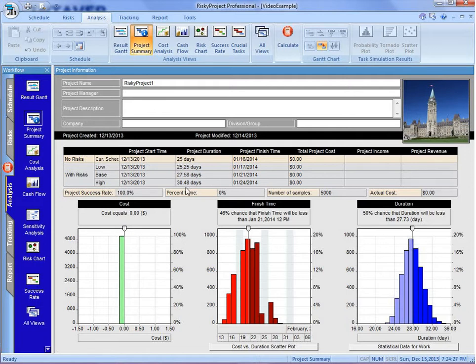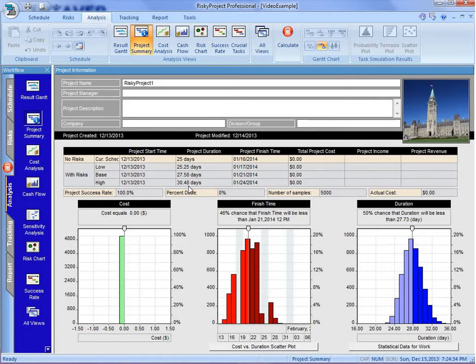And our pessimistic, which is P90, where we have a 90 percent chance of meeting that date or less, is 30.48 or 30 and a half days. We've just seen the same sort of outputs with the project finish time.